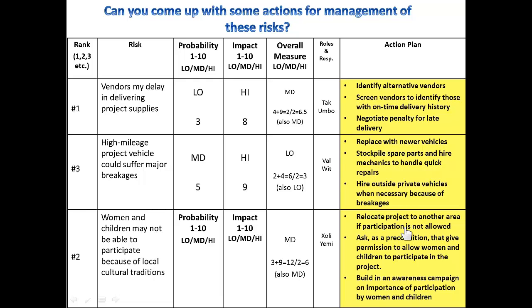The problem with women and children not being able to participate because of local traditions could be managed by having the management team relocate the project to another area where participation is allowed. They could ask for a precondition that allows women and children to participate in the project, or they could conduct an awareness campaign on the importance of participation as part of the project plan.